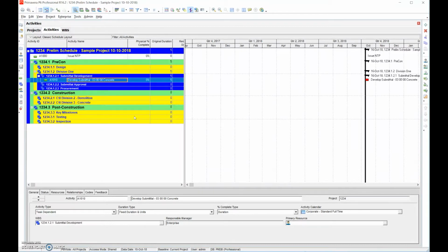This is important because if the project is phased, it can make it difficult if you're not very specific. If this was going to be phase 1, phase 2, although the phasing may be in the WBS, it's important in the task to actually say what it would be like in phase 1, because if you remove or compress the WBS or go to various different levels, the phasing may be lost in the WBS. So it's important that we're very clear what task is taking place.